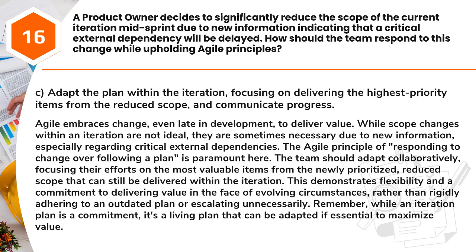Answer: C. Adapt the plan within the iteration, focusing on delivering the highest priority items from the reduced scope, and communicate progress. Agile embraces change, even late in development, to deliver value. While scope changes within an iteration are not ideal, they are sometimes necessary due to new information, especially regarding critical external dependencies. The Agile principle of responding to change over following a plan is paramount here.